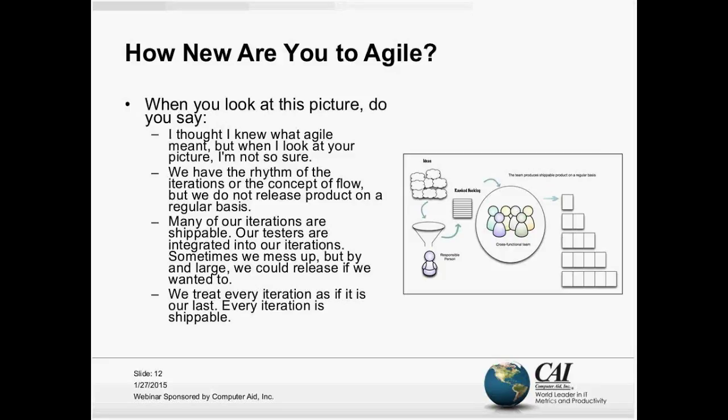After a while, say every couple of weeks, the team reflects on this process and does maybe a formal demo or a formal show and tell to that responsible person. And when that responsible person sees that, they end up creating a new ranked backlog or changing what the team needs to work on next. So the team keeps pushing out, for lack of a better word, fully functioning, releasable product.